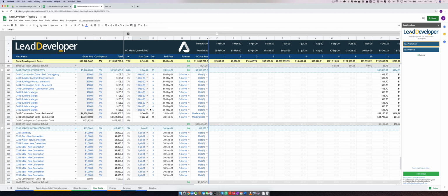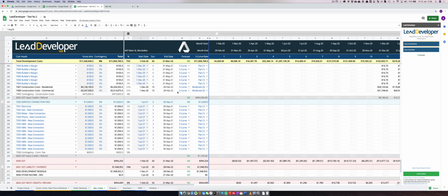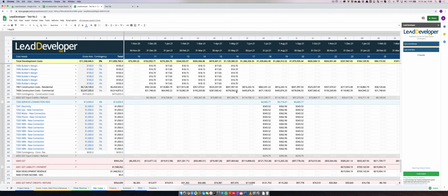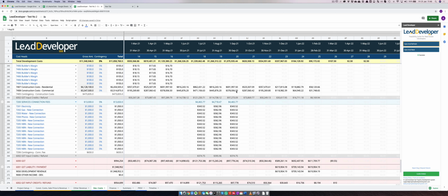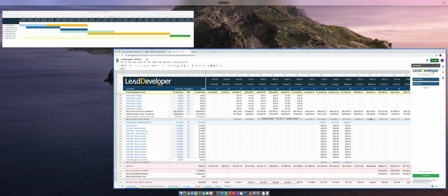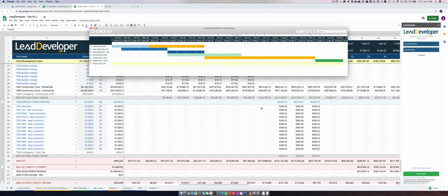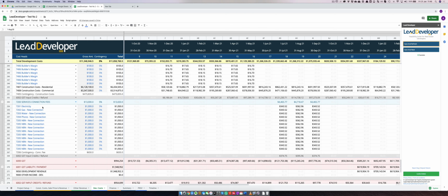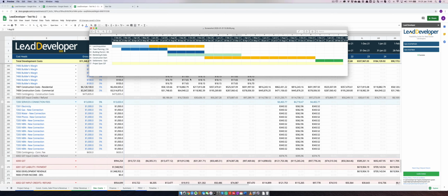But I wanted to show you, fill out all of these things and show you all the different methods that we have. When is the money coming in? Like, for example, service connection fees. If we look at our timeline over here, these new connections to the new development that you are doing would happen somewhere around this time, because that's when you are closer to your construction.